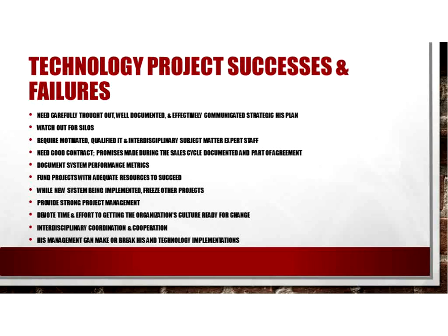Following your contract guidelines is going to be paramount when you're negotiating with your vendors. Some things to look at: percentage of the vendor company's resources devoted to research and development for the project under consideration, how the company is going to respond to issues that develop over the course of the project, conformance with HIS contracting guidelines, vendor organization stability and longevity, how they deal with change of control, and what's the vendor's reputation.